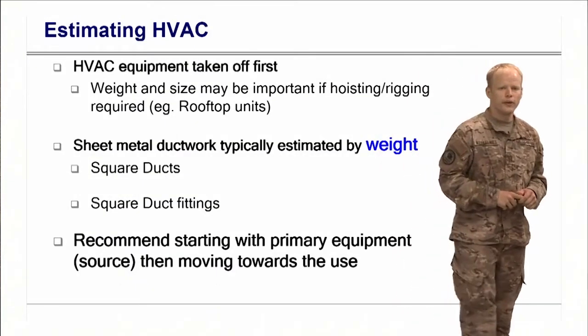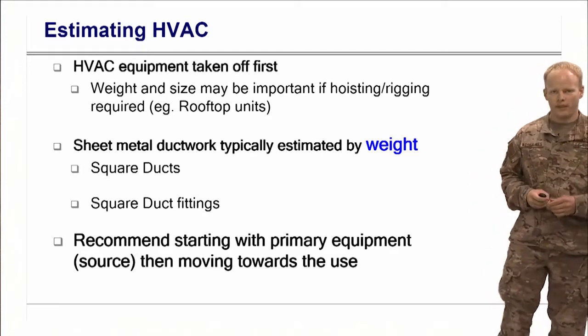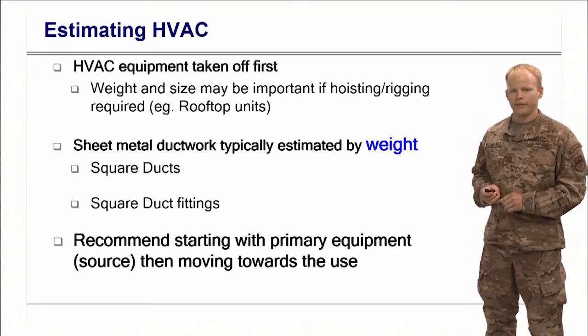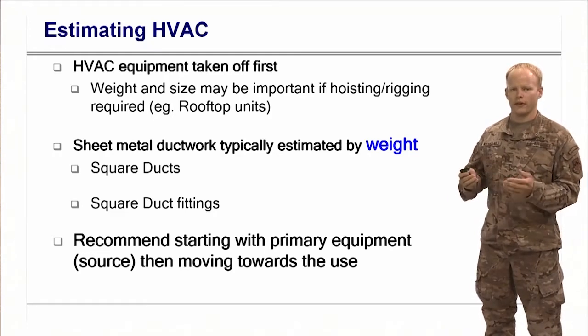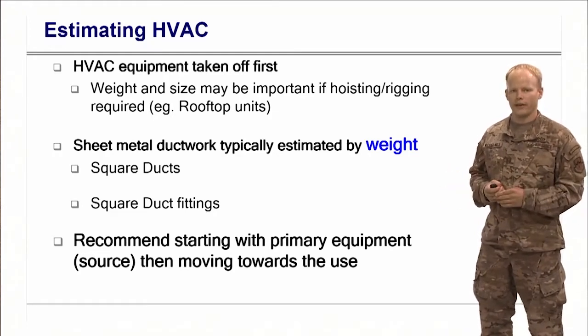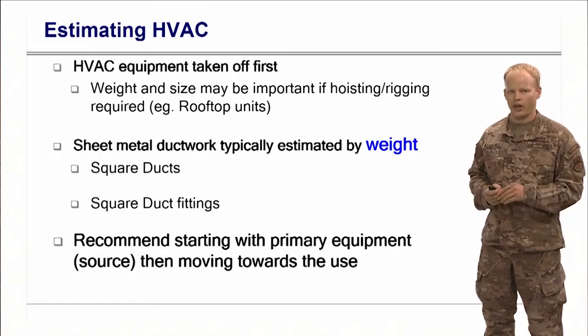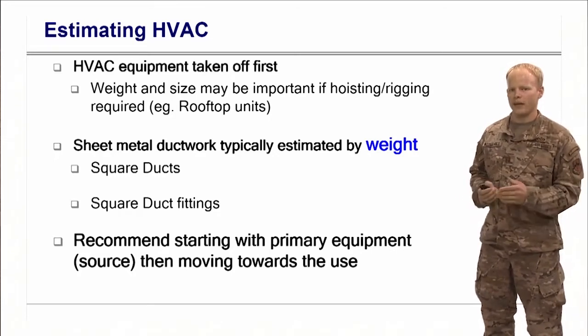As you're going through, you can start with the HVAC equipment. So at your source, start with the big equipment. So your chillers, your package units. If you start with those, they are going to be a significant portion of your cost. Weight and size may be important.